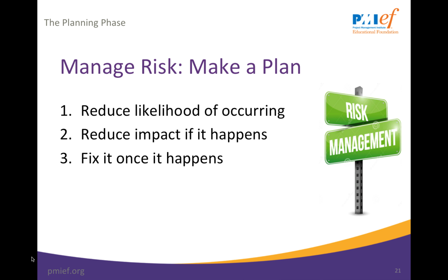Once the risk level and areas of impact have been assessed, each risk can be paired with a corresponding plan to address it. This may mean identifying what can be done to reduce the possibility and/or what can be done to reduce the impact if the negative event occurs. Sometimes as part of the risk management plan, there are resources allocated for contingency, setting aside time, funds, and other resources to be used only for unplanned events.